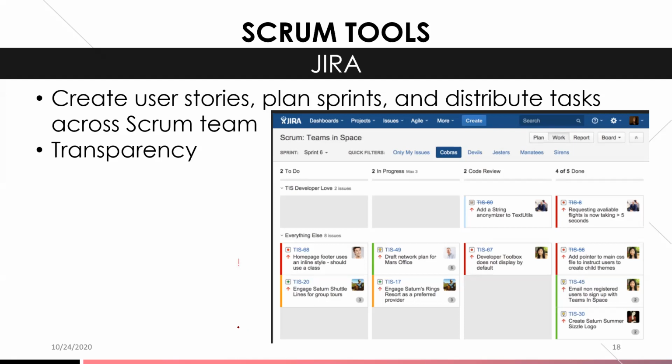So basically, like I mentioned, you want the stories to be broken down into smaller components so that the stories can move further into done. If you have a huge story, the story will stay in progress for a long time. So that's the beauty of breaking down the story into smaller components.